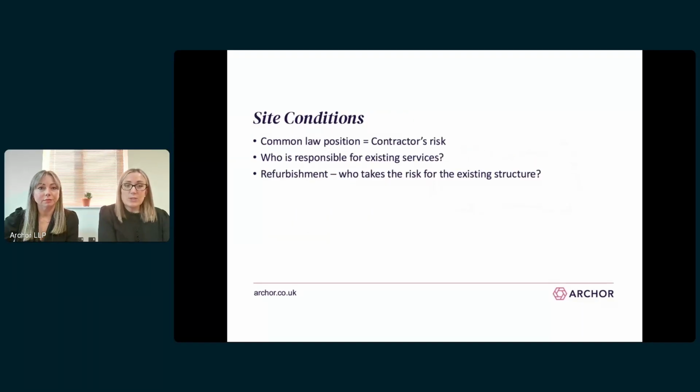Okay, so moving on to site conditions. As a preliminary point, we find that contractors are often surprised to discover that under common law, contractors actually take on the risk of site conditions. And this is also the case under an unamended JCT. Conversely, the risk of existing structures is ordinarily taken on by the employer.